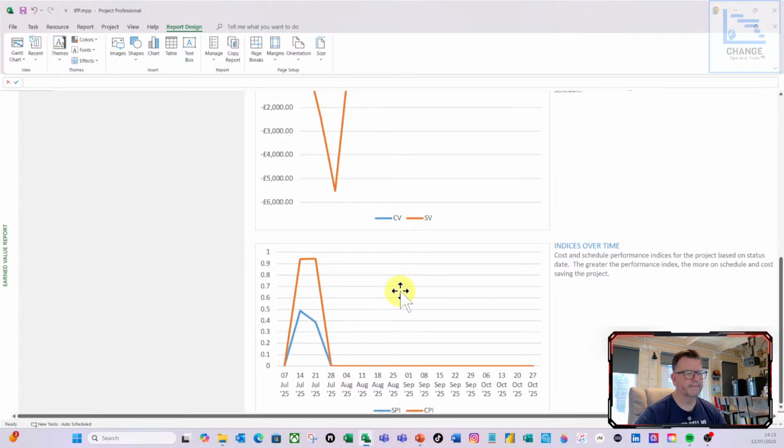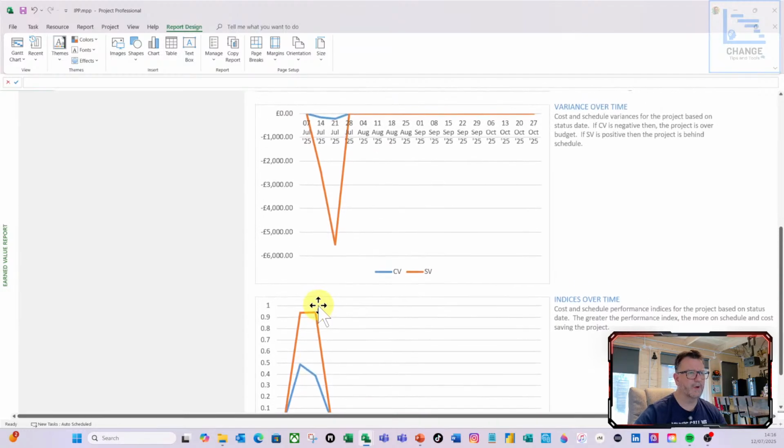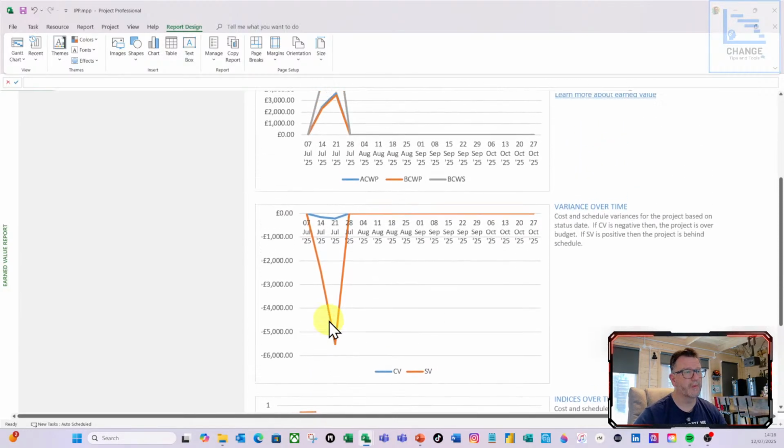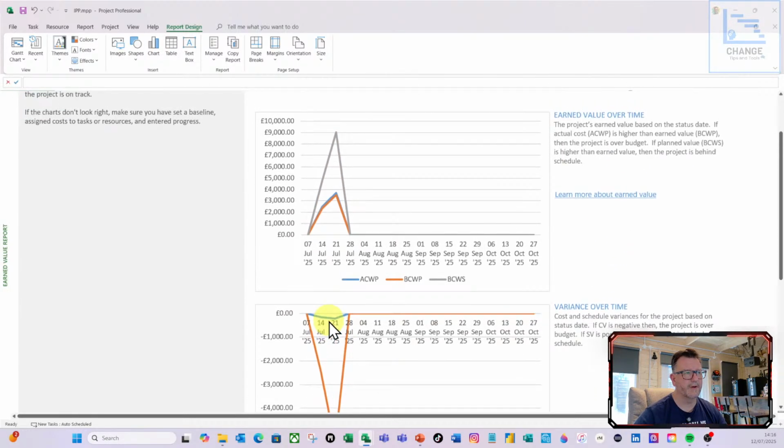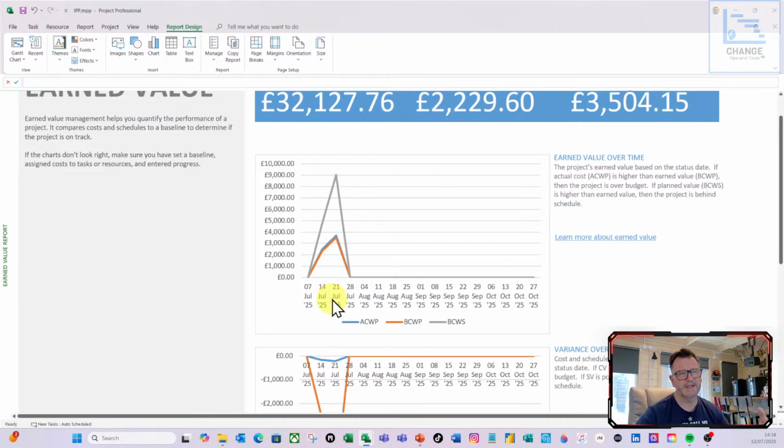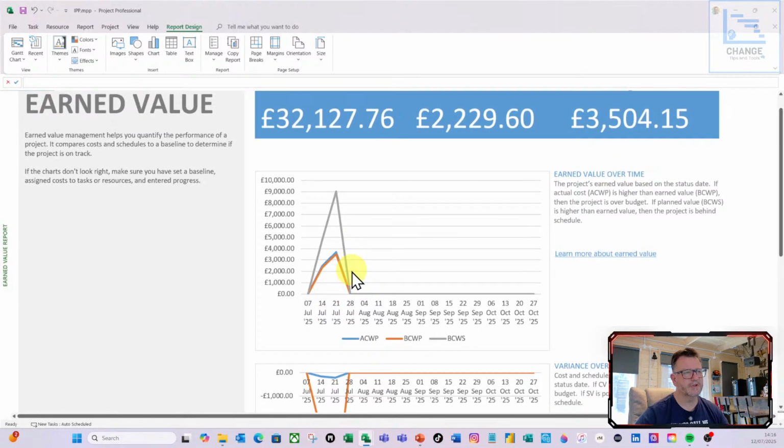And what's going on. So again, they're below. So my schedule is definitely below the 1. It's not higher, so it looks like we are going to deliver this project late. The CPI here, the cost performance indicator again, is telling us that we've got some problems in our program in the early days. So there is some work that needs to be done to do some crunching around this.